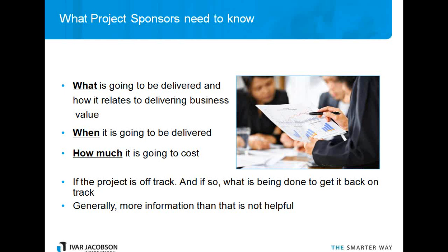They have things that are happening in that business that are dependent upon this new or updated solution that you're going to be delivering. And there's a lot of coordination that has to go on. So that "when" is very important. If things slip by a month or by a quarter or even longer, then it's very disruptive. They're not going to get the business benefits when they want them, and they have to plan to run the business differently. So there is an important reason why they keep asking about dates, and it's not just because they want to know if things are on track, but they do, but it's because there's a lot of other impacts as well.